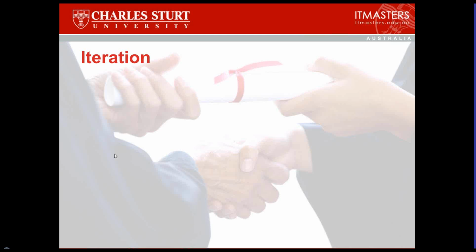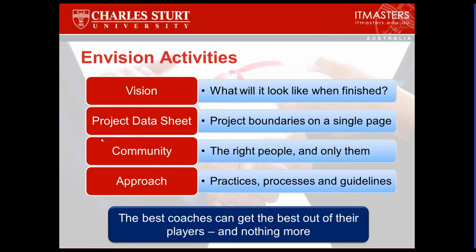There is, and what we've just looked at, I'm going to go back a slide and explain it this way. You're going to get from the vision statement, you're going to get the elevator pitch. No more than 2 minutes of presentation. Now that can be defined in a single page or half a page of written word if it gets converted into a document. It's brief.